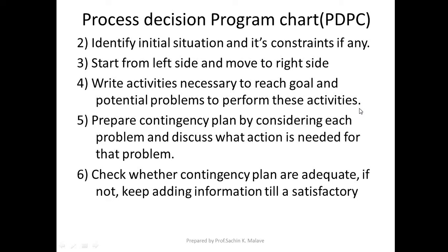So for each activity you have to try to find out what can go wrong and what the alternative solution is. Okay, so prepare the contingency plan by considering each problem. For each problem there should be a contingency plan, so that you do not get stuck at any point of the project. So for each problem there should be plan A, plan B, plan C, like that, and discuss what action is needed for that problem. Check whether the contingency plans are adequate.